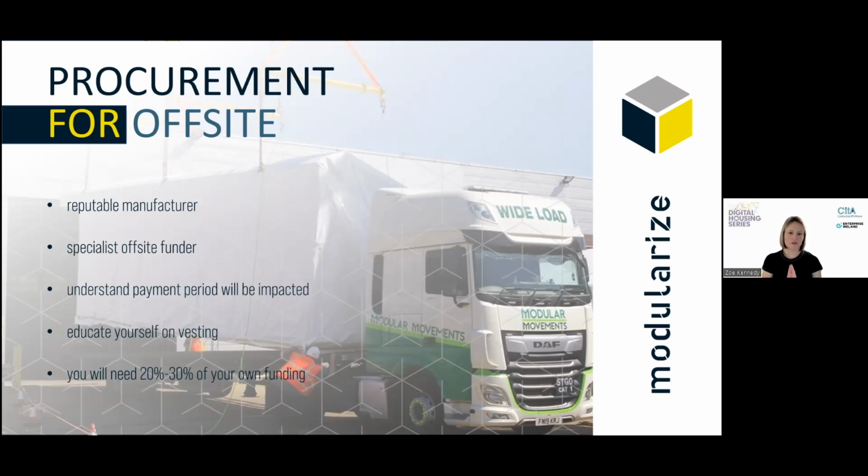But we also need to consider who's going to be responsible for damage caused during transport and install. So contracts do need to be bespoke, and they have to set out all the provisions for these obligations.